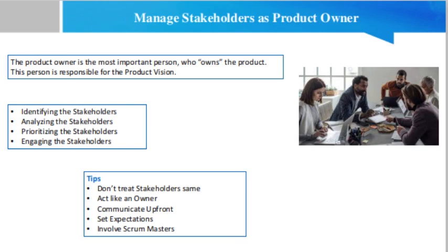Engaging the stakeholders. This is the last step where execution takes place. Now that we have identified, analyzed and prioritized the stakeholders, this is where we will implement the communication plan. Determine different action plans, whether we are going to have one-on-one conversations, meetings, or going to communicate through emails. We define and execute our plan accordingly and keep the stakeholders engaged as required, thus managing all their expectations.